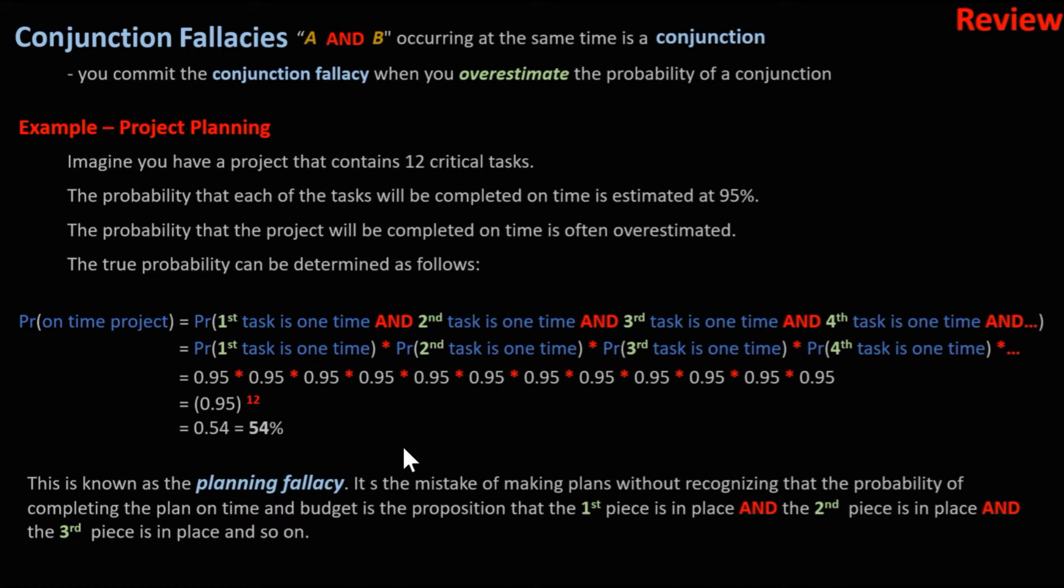What they fail to realize is in order for the plan to come in on time, the first piece has to be in place on time and on budget, the second piece has to be placed on time and on budget, and so on. Quickly that probability reduces to something quite small.